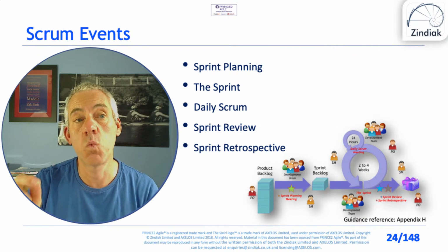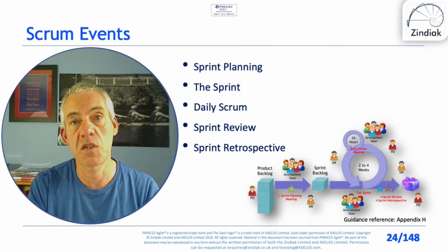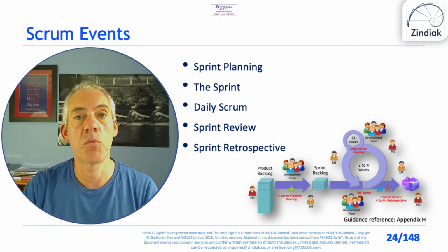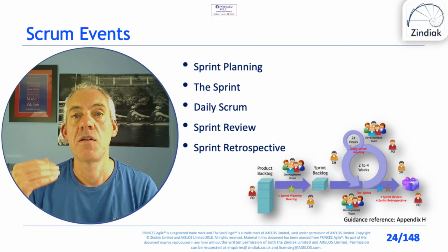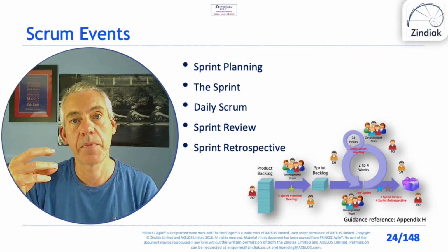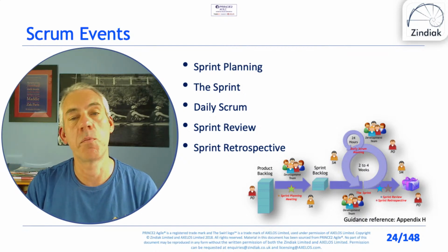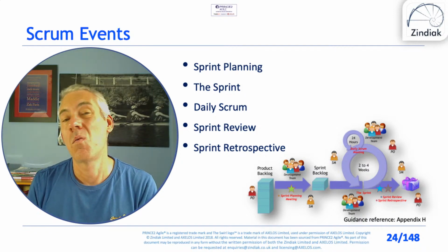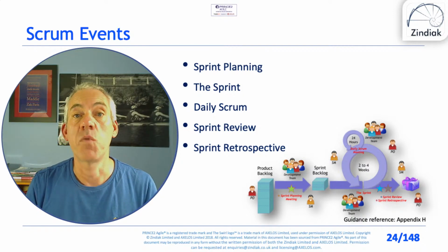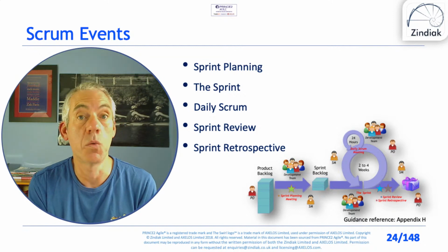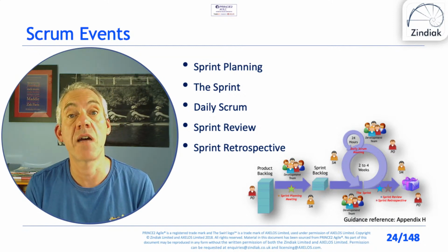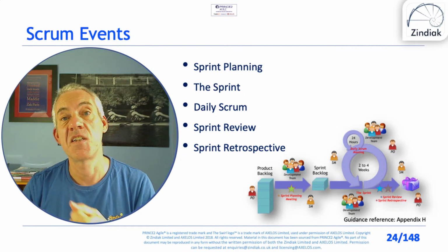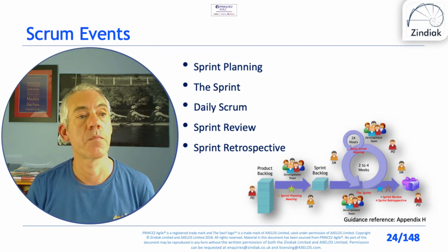And really that's one of the things I would be reviewing in the sprint retrospective: are we breaking product backlog items down to the optimum size? Are we breaking them down too much or not enough? If we don't break them down enough, we're increasing risk. If we break them down too much, it could be wasted effort, and we don't want to waste effort. We want all our effort to be adding value.